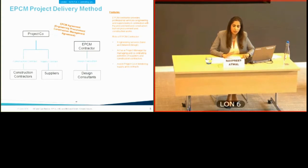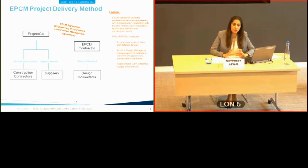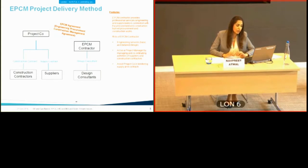The EPCM delivery method is typically seen in downstream construction projects because those facilities are heavily engineered and require a large amount of coordination. It is unusual to have a single EPC supplier that will do everything in those cases.